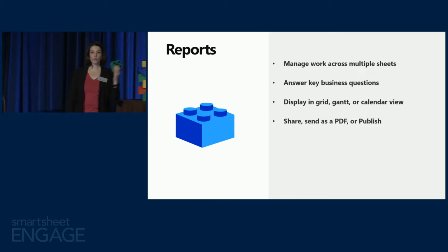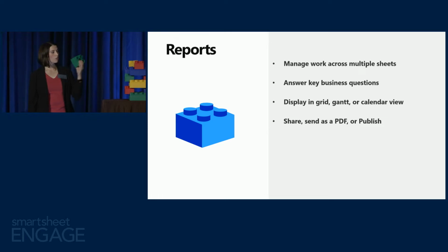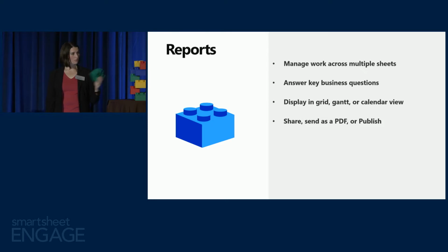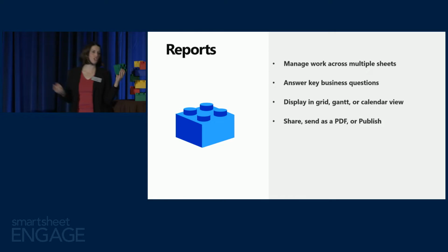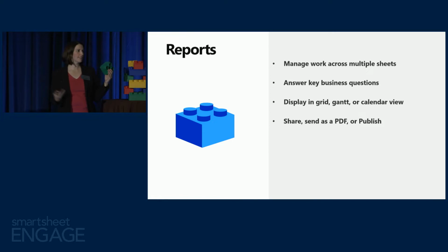The other powerful thing about reports is that reports are bidirectional. Because it's like a high-level filter, if I update information in a report, it will automatically push that information back down to the underlying sheets. So reports are valuable for also data management across multiple sheets. Say, for example, I have Sally on my team. And again, I've got her assigned to different tasks on 5 different sheets. And it turns out Sally's going to roll off the team and Bill is going to take Sally's spot.